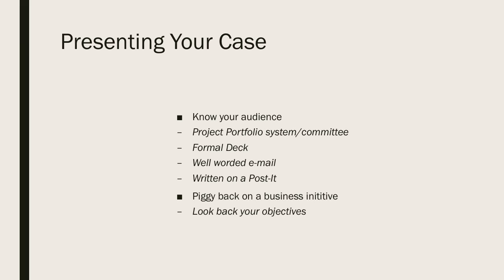If I'm going to implement SAP HANA, that changes this whole distributed system. If I have a location in Asia that puts in a query over the WAN, and that query normally takes, let's say, 15 minutes to run on a non-HANA database, and now I've upgraded the database to HANA, and this query takes seconds to run, but I'm on a slow WAN link in Asia, now I've moved the bottleneck from the database to the WAN link, and I didn't take into account that I needed to upgrade the WAN link.